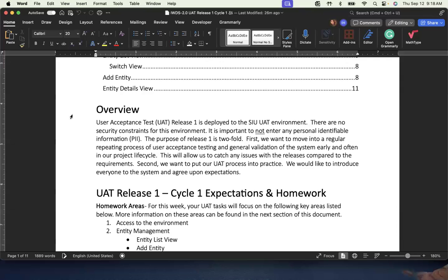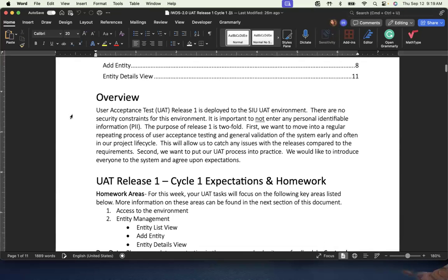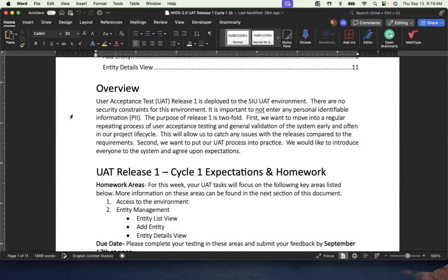we test every week as we go along internally, but they're really more finite pieces. They're smaller pieces, and they don't necessarily add up to a full feature of doing something in the system. So that's why we don't release the UAT on every sprint. We're going to release the UAT on a controlled methodology, and this is how we're going to release to you. That's the reason we want to get you in there early and often.